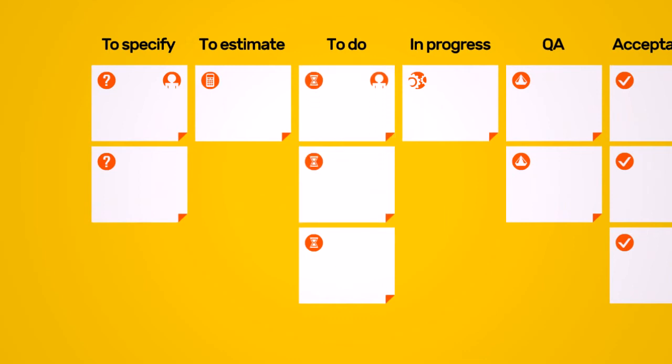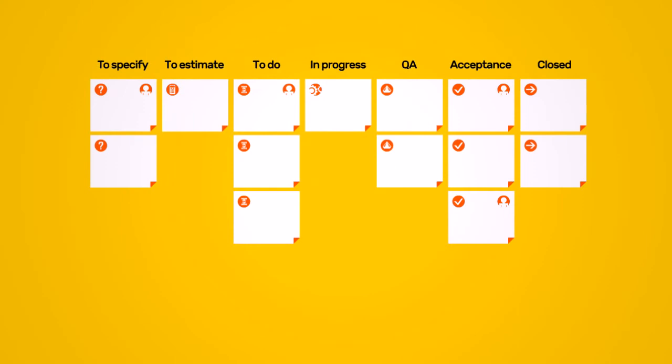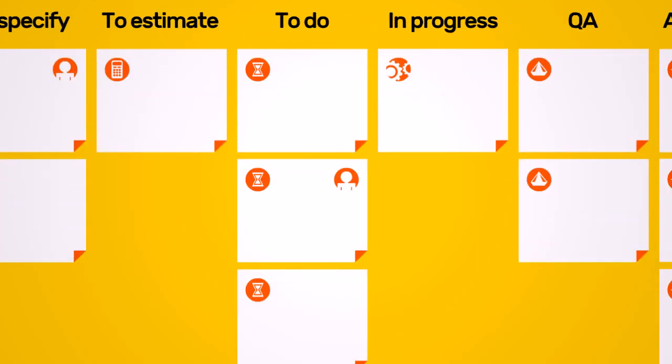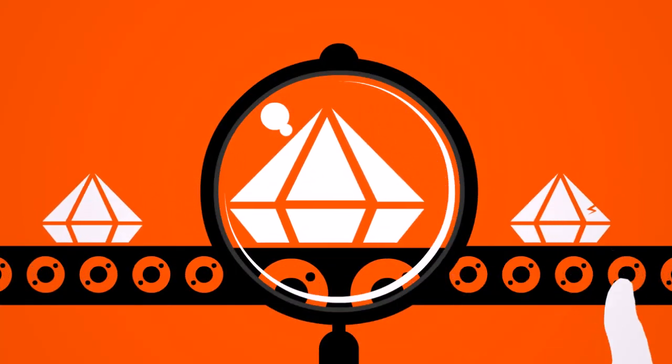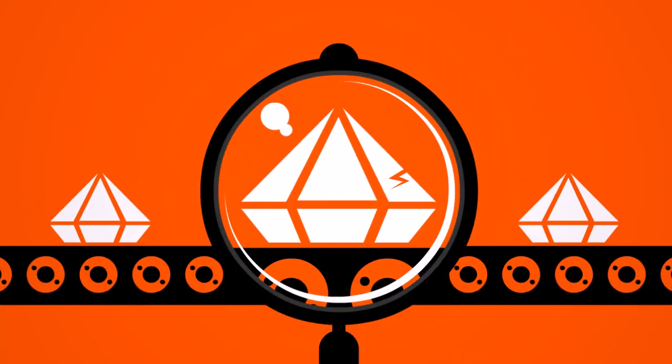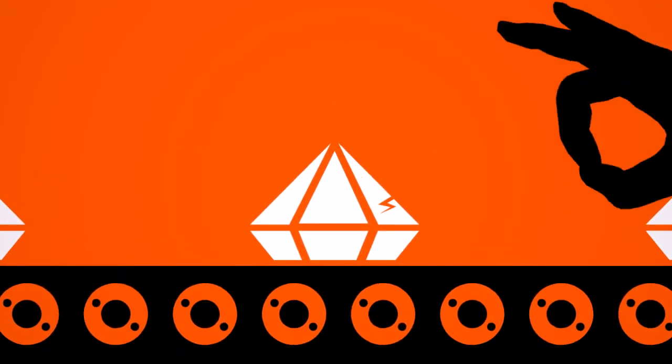At any time, the order of user stories to be implemented can be changed by dragging them to the top of the to-do column. This allows for having a very detailed control over work priorities and actively adjusting to any changes, thus fulfilling the fast change adoption goal. We can speed up the process by assigning multiple developers to implement user stories in parallel. On the user story level, quality is achieved by the basic production line and definition of done with quality assurance tasks performed by the developers and QA personnel.